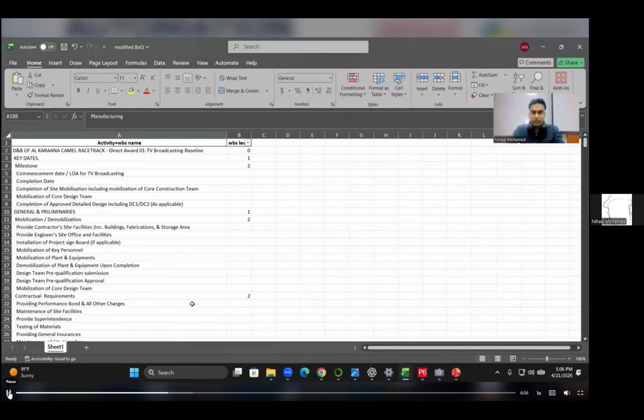WBS levels indicate that if a zone is completed, that is the first WBS level. The first flow completing and the second flow completing might be the second or third WBS level. Completing the columns, which have quantities, may be considered as activities.